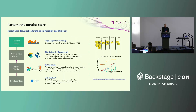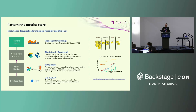A good example for the decoupled pattern is visualizing Jira data as a Cumulative Flow Diagram (CFD), showing the amount of work in each state. You cannot do this by interacting directly with the Jira API — the API gives you the list of transitions between ticket states, but you definitely need additional processing to compute the chains. It's a good example where you need that decoupled pipeline.